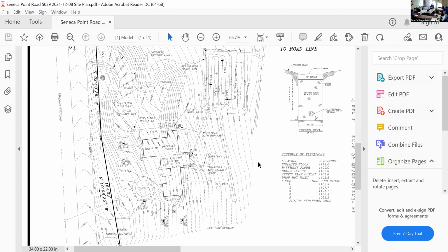So now you're just paying for the permit, which is gonna actually save you in the long run, because I can almost assure you that Chris goes out there one time and you're gonna have a bulldozer. Because if you look at the septic system here, he traced this line right here, and then traced this. Your bulldozer is gonna cut across here and some of that, and boom, you're in an acre, and suddenly I'm stop work order.